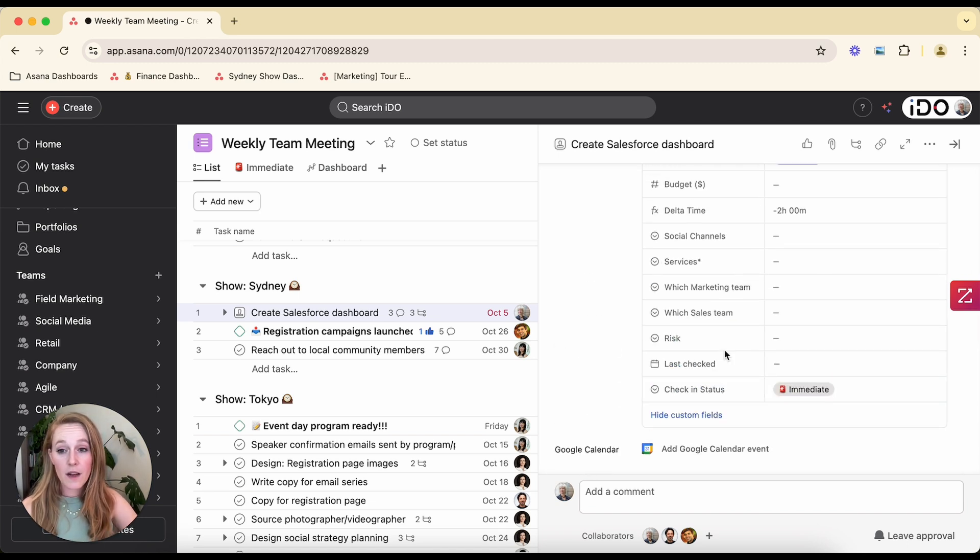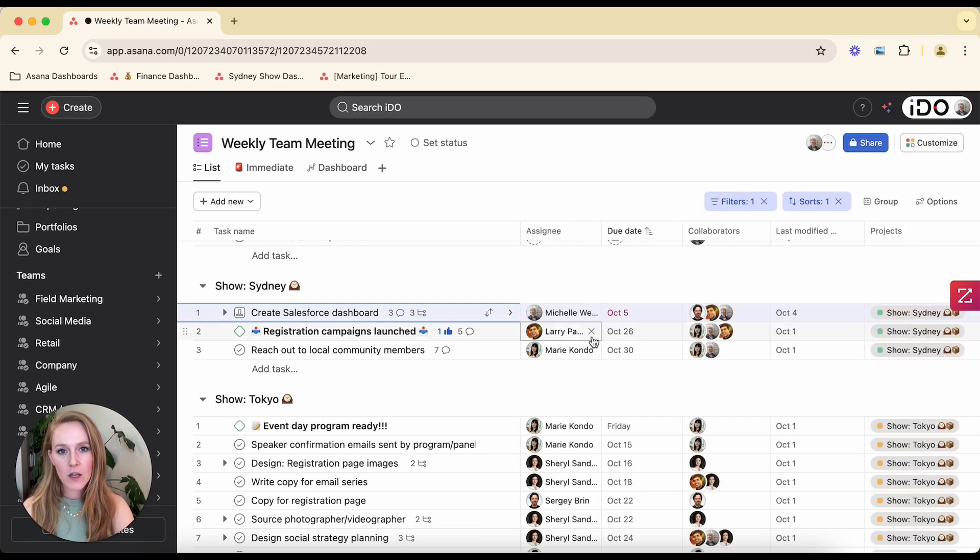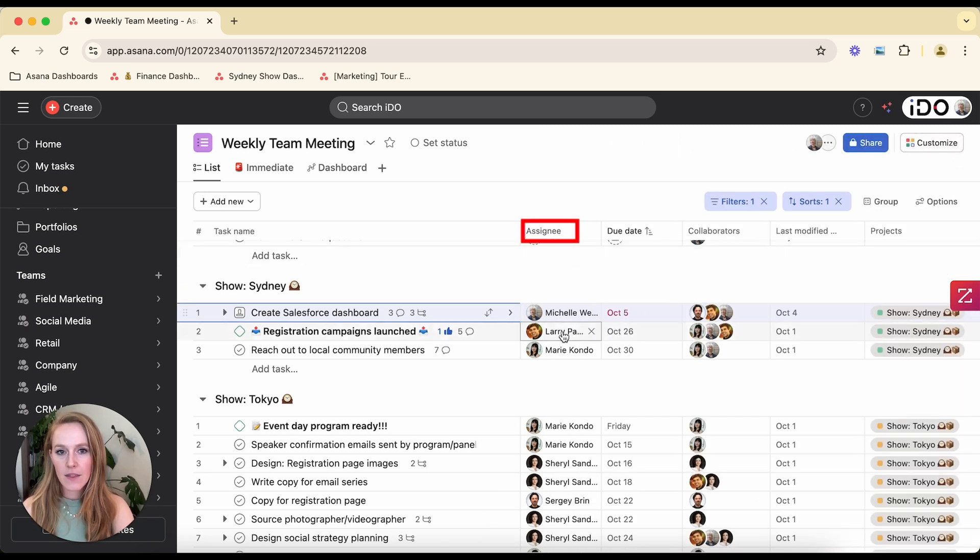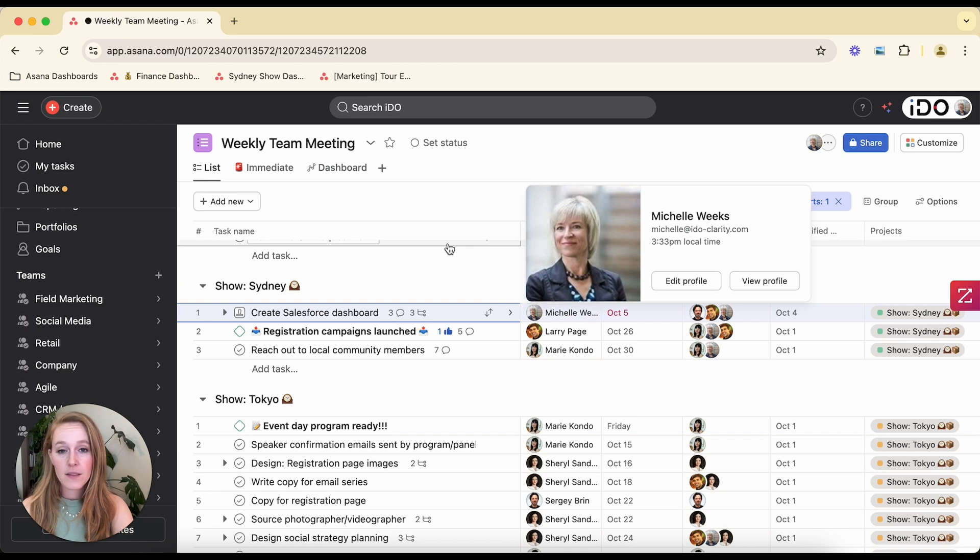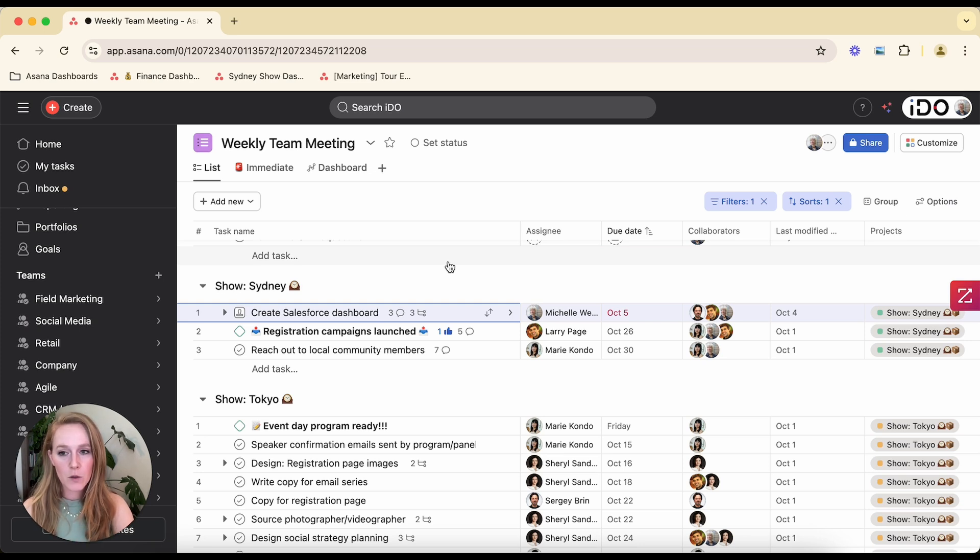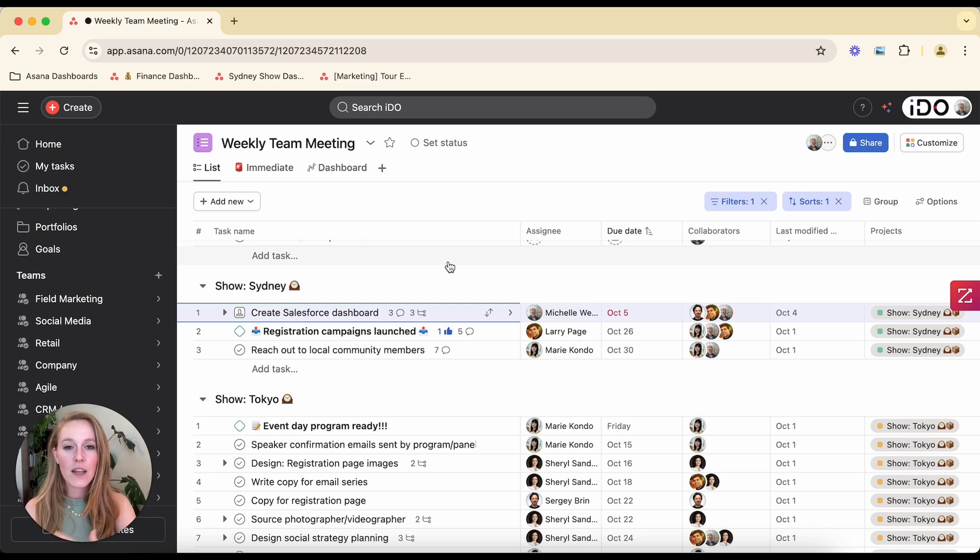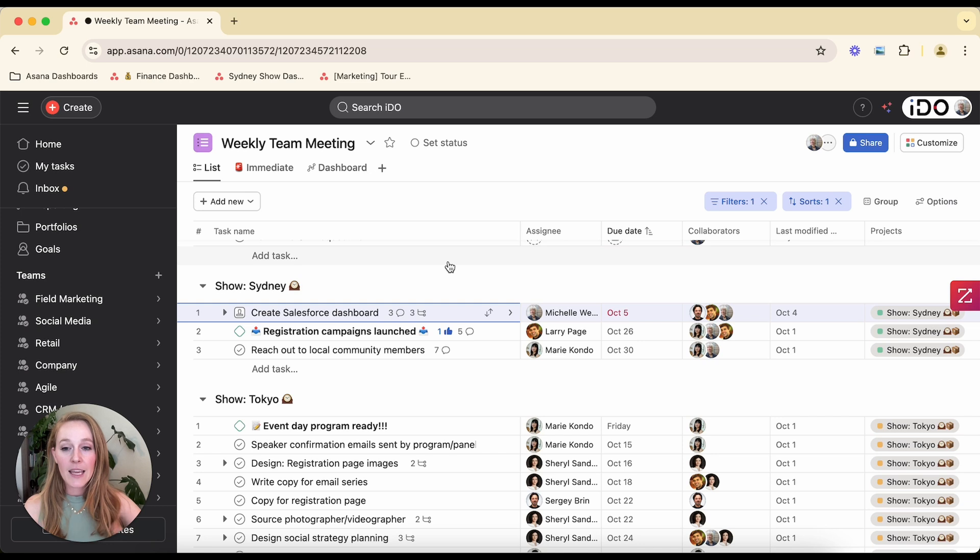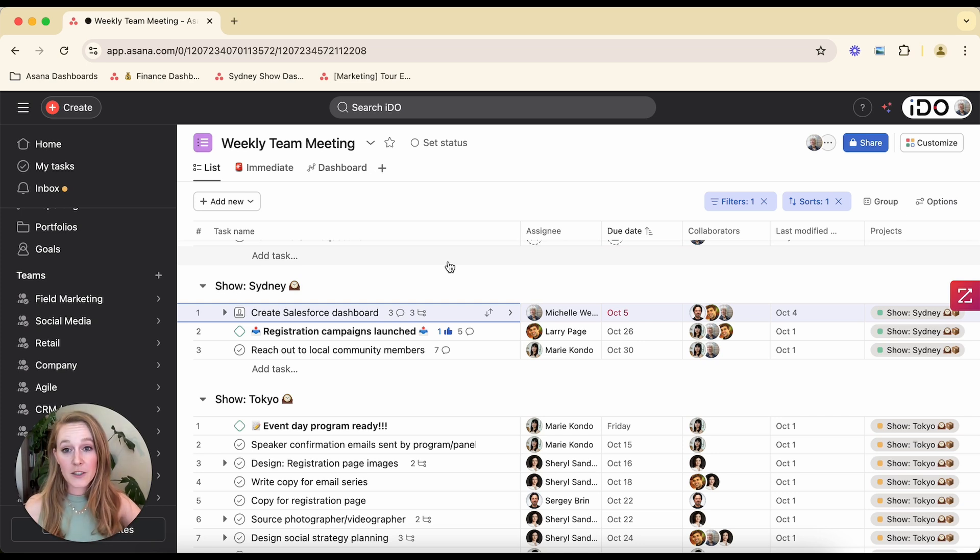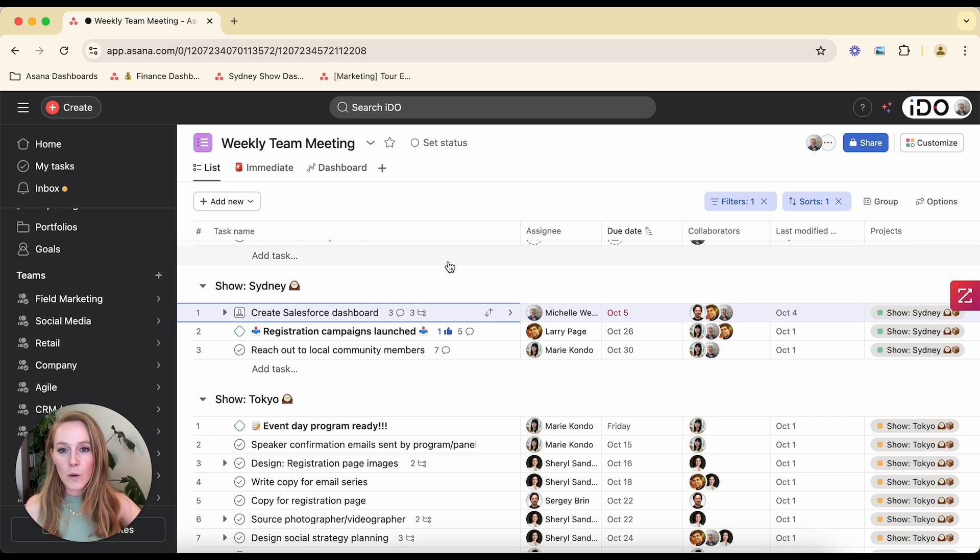Third, I want to talk about assignee. So as you might be seeing here, we have a column in each project called assignee and there's only one person. So within Asana, you actually can only assign one person a task. And this is very intentional because you don't want to create confusion about who is doing what. So Asana forces you to bring this clarity to your tasks, to your projects, so that only one person is responsible. If you think that you need to assign the task to two different people, you probably just need to create two different tasks so that there's a record for each person. They both know they are responsible and there's no question about who is doing what.